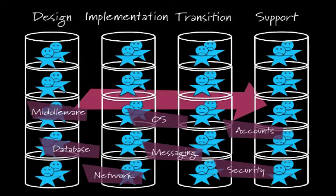And not only that, but because of all these handovers they have to have, you take that 50 people, and you start needing to add in project managers and more testers and all kinds of overhead in order to manage that. And that soon blows up to where you've got 100, 150 people dealing with that product.